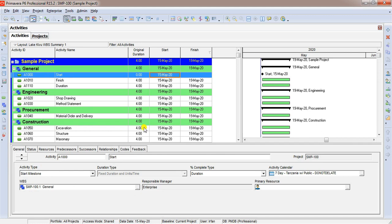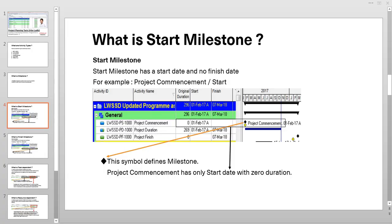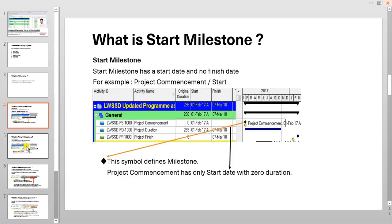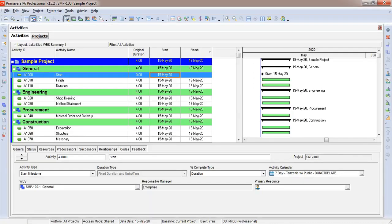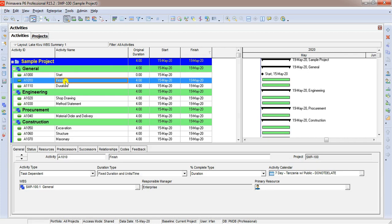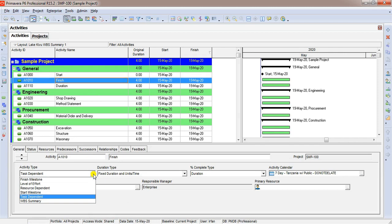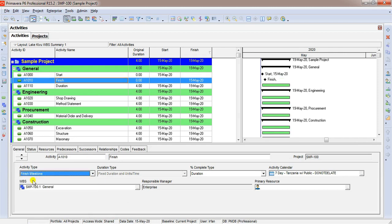Similarly, we will talk about finish milestone. Finish milestone is exactly same but it has only a finish date, not a start date. Let us go to Primavera and set the activity finish as finish milestone. Select finish milestone and if you see the duration is zero, there is no start date and there is only finish date.